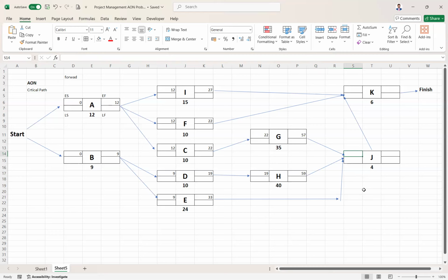We are moving forward. What we have done in the previous, we have taken the maximum value. Simple. Same maximum value again. Why? We have calculated the critical path. That's why we have to take the maximum value. Why should the critical path be maximum? So that in crashing, we can reduce the duration. Why do we want to reduce the duration of the largest path? So that we don't have to face the penalty for not finishing the project within the time.